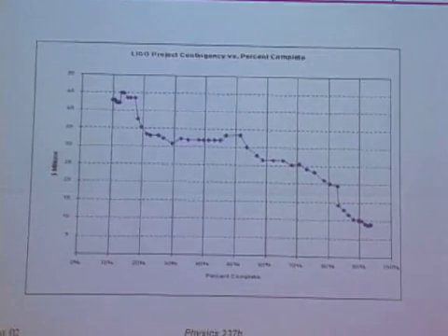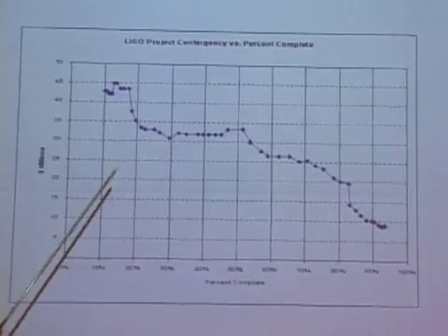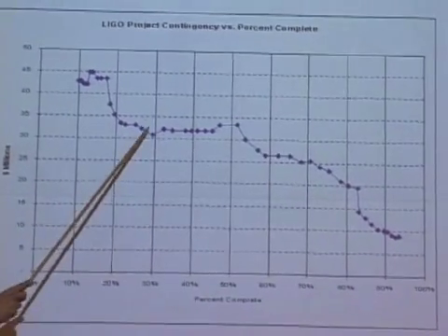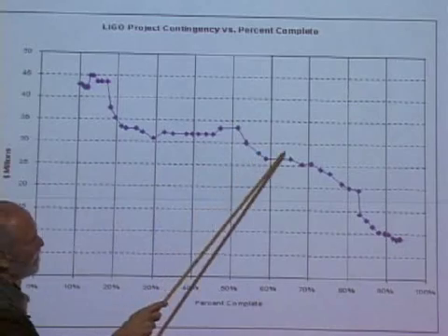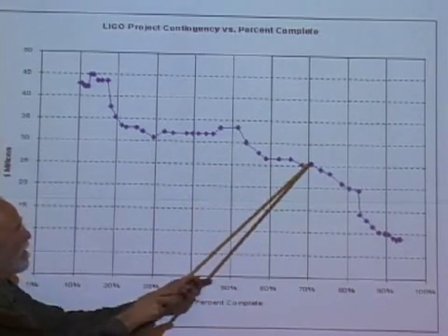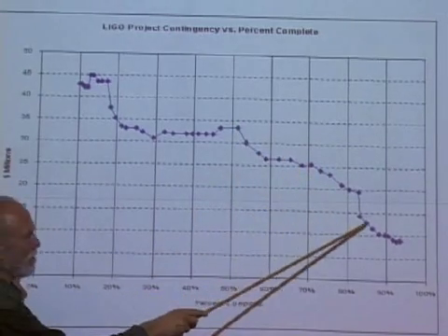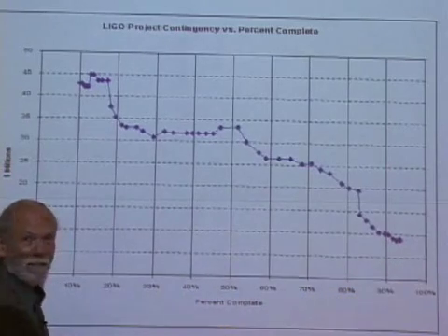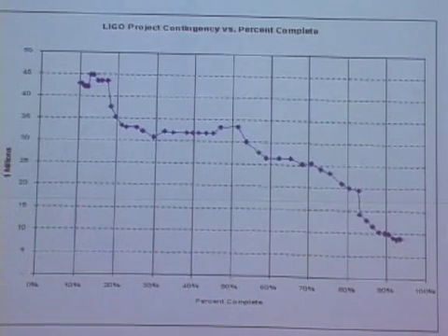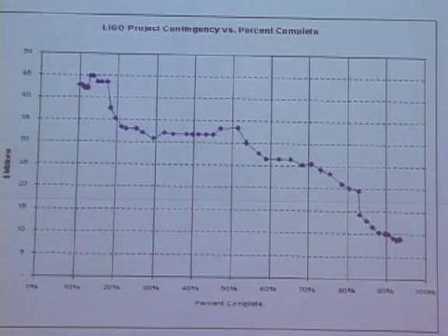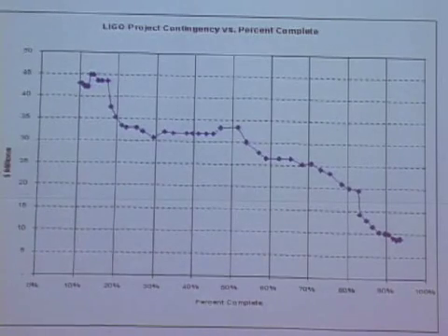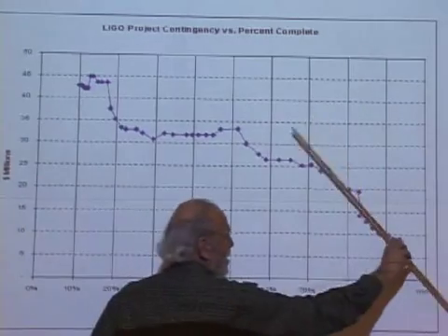There were some choices. Then you basically watch this, and this is the amount of money that you have left that isn't committed. You want to get to where you exactly spend the last dollar on the last day, you don't have to give a penny back to the government, and you don't overspend anything. That's just a tuning job right at the end to bring this down.